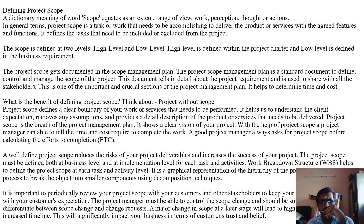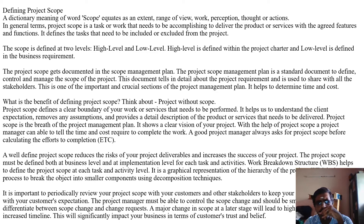The scope is defined at two levels: first, high level, and second, low level. High level is defined within the project charter, and low level is defined in the business requirement. The project scope gets documented in the scope management plan, which is a standard document to define, control, and manage the scope of the project.